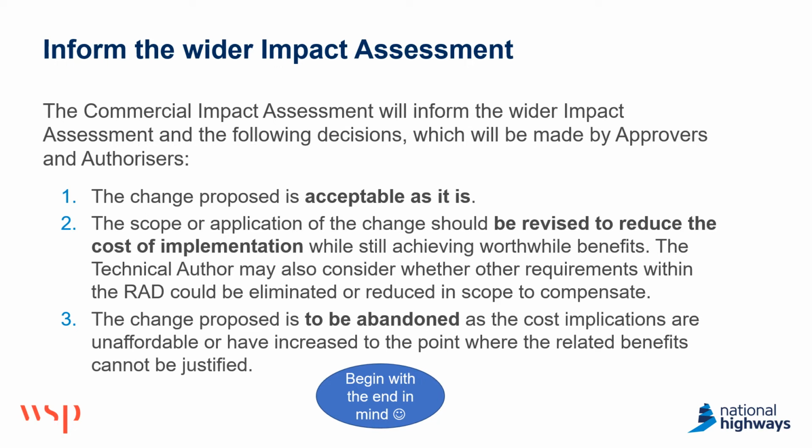The technical author may also consider whether other requirements within the RAD could be eliminated or reduced in scope to compensate. Or maybe the change proposed has to be abandoned because the cost implications are unaffordable or they've increased to a point where the related benefits cannot be justified.